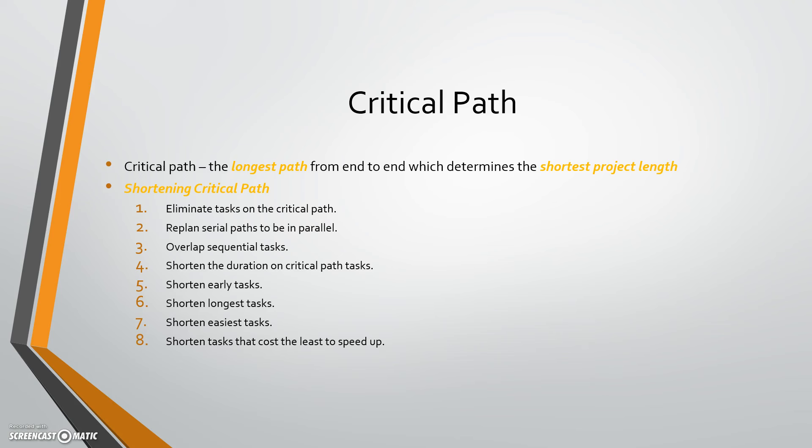There are things you can do to shorten the critical path. You can eliminate tasks — maybe some things were not actually necessary but would have been nice to have. You can make some things that were sequential non-sequential, or overlap sequential tasks — two strands of sequential paths done at the same time. You can also shorten the duration of tasks: shorten early tasks, the longest tasks, or the easiest tasks. And you can add cost, which means getting additional resources to speed things up.